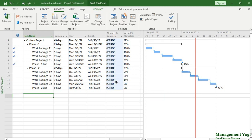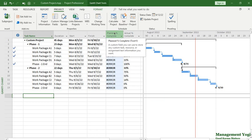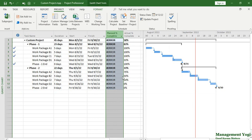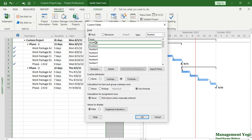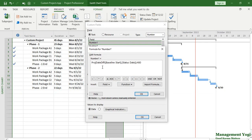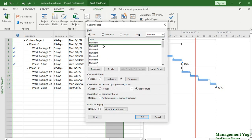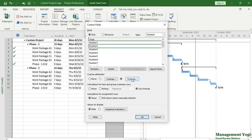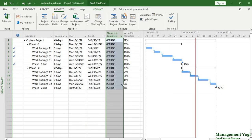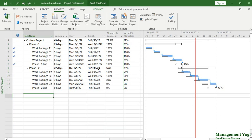This is because in our formula we are also considering the baseline start as well as the baseline duration. I'll select the plan percent complete, right-click, choose Custom Fields, and in the right-side Type category choose Number custom fields — we have Number 1 through Number 3. For Number 1, the formula references baseline start and status date; for Number 2, it references baseline duration. So if you have not set the baseline, of course you will get error notifications. Again I'll revert by doing undo, and the values are properly populated.